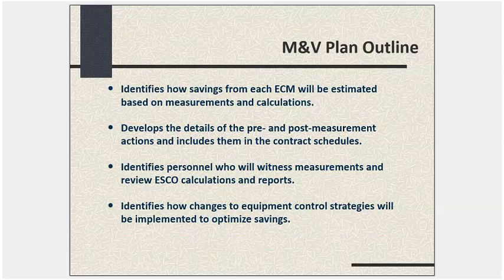maybe contract schedules potentially. Especially a contract schedule for commissioning may be relevant, because sometimes you may need to commission the equipment before you do a post-measurement of some kind. So there can be a relationship between M&V and other components of the contract schedules.